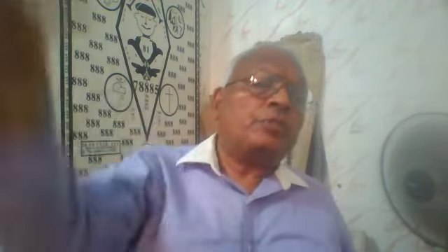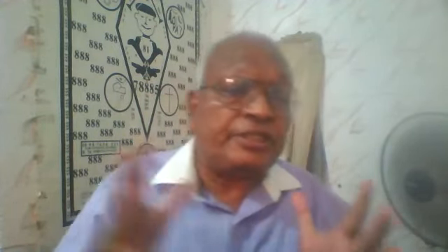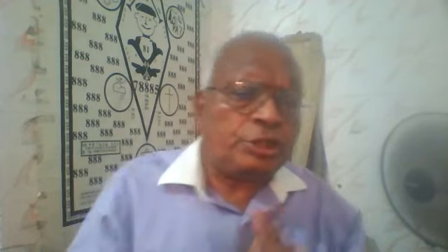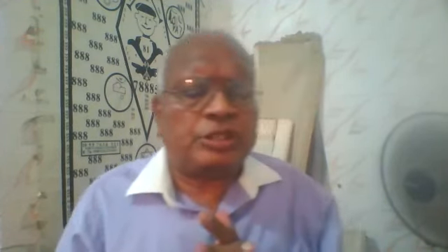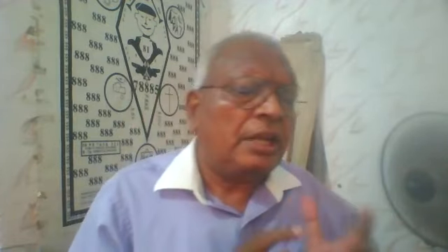Now we are talking of the progress report. Monthly we have to submit. You think we only submit that? No. Every day we write a daily report. In that daily report we say this is the name of the project, this is the budget number, this is the activity we planned today, this is the activity we did today, this is the percentage we achieved today, this is the temperature today, this is the humidity today. We record how many workers, compressors or staff we have, and the subcontractors, where activities are ongoing in each discipline. The same way we repeat for our own systems, electrical, mechanical, etc.